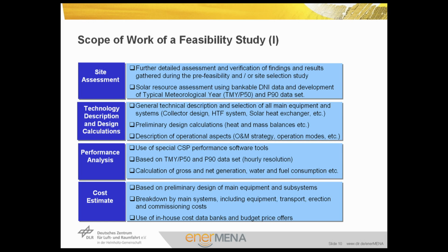During the feasibility study, a close relationship with the off-taker, the transmission company, should be established to understand better their particularities. For example, to what extent the overhead lines could be shifted, whether the plant can evacuate power, what the specifics are in back energizing if the project is close to be commissioned. All of these topics have to be analyzed in order to have a full picture of future problems.